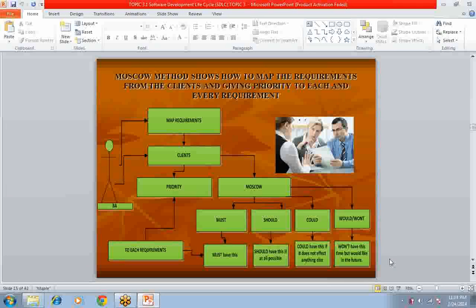If you give 5,000 or 4,000 requirements to the BA, and the BA explains it to designers and developers, these people say it is not possible to design these requirements in 1 year. So we need 6 more months or 1 more year. That means automatically, if the time increases, the cost of the project will also increase. So now the client is not ready to give that money. The client is saying, no, you have to do it. Then what is the other way you have?